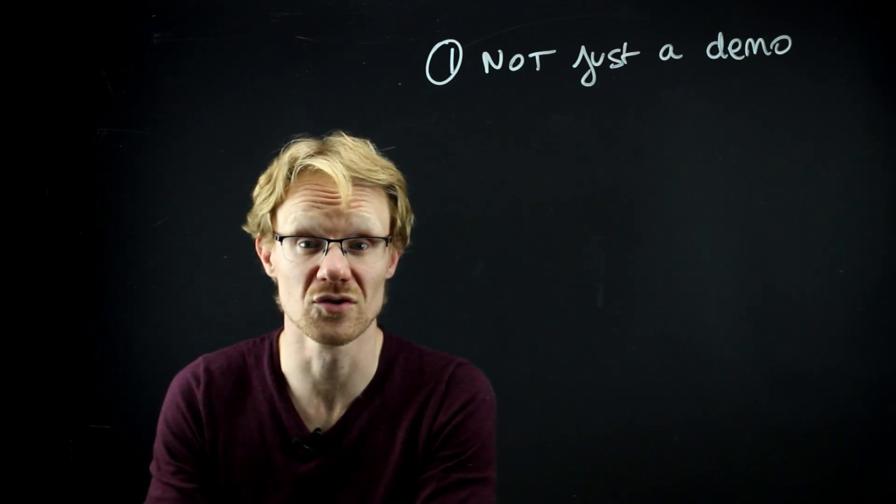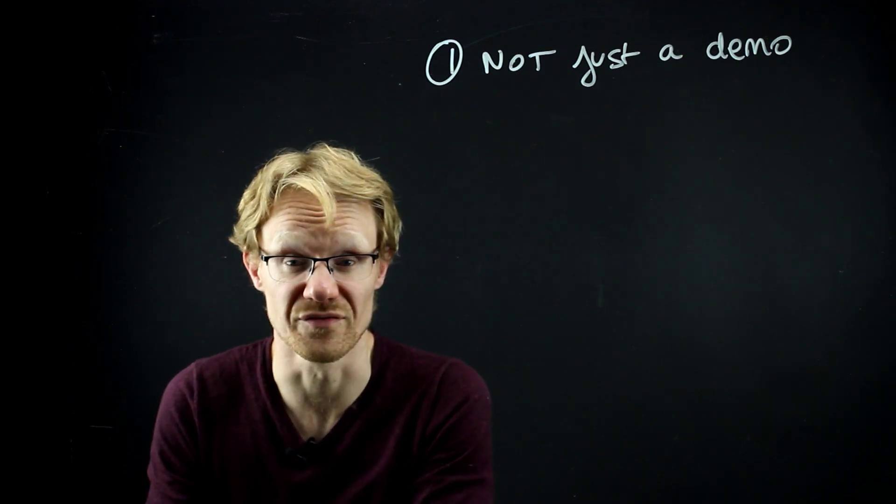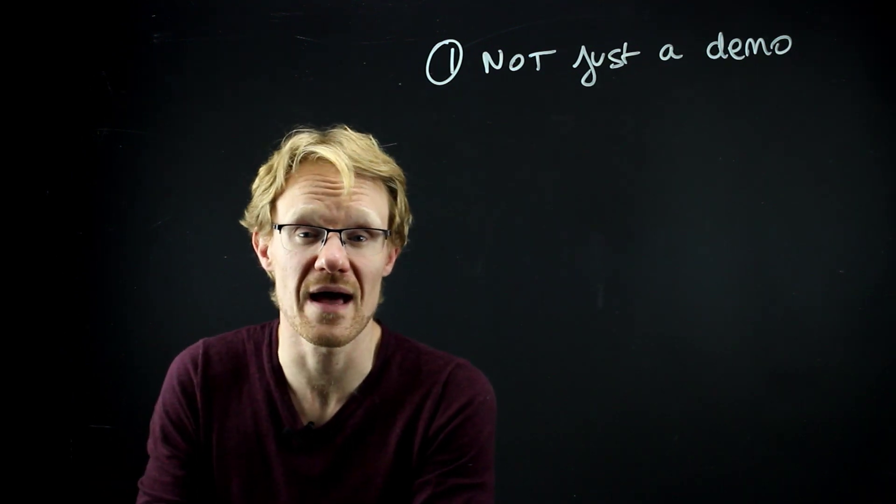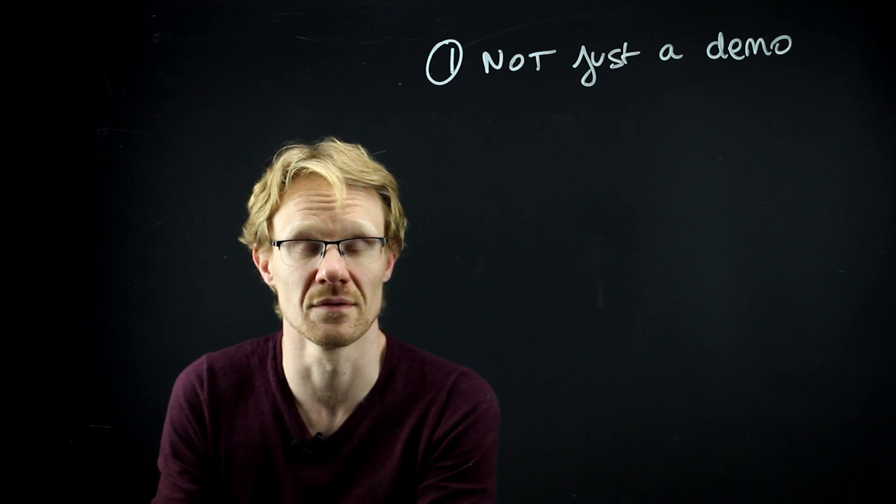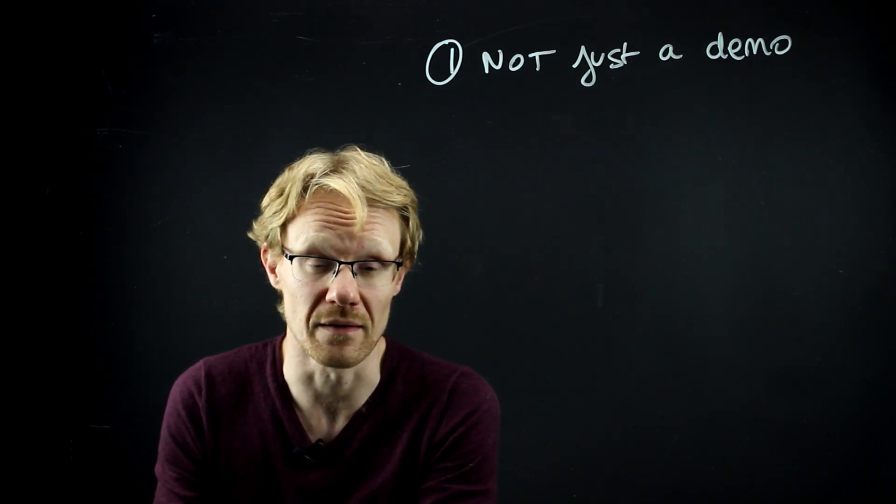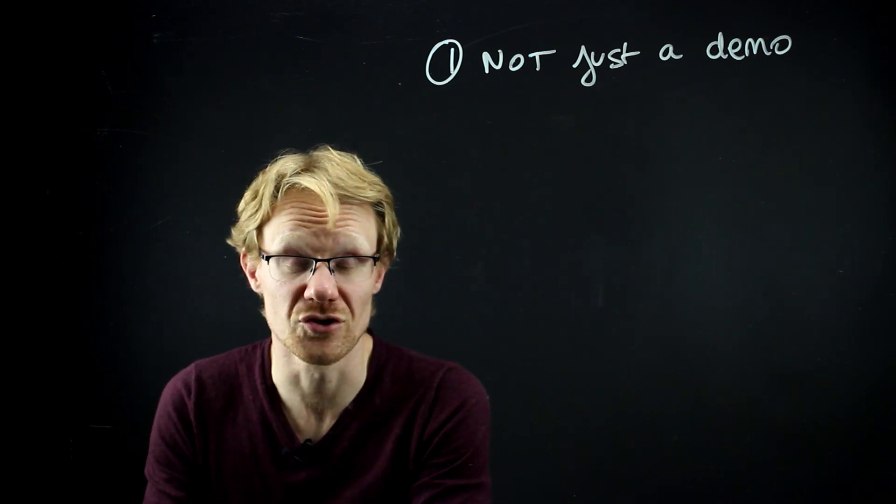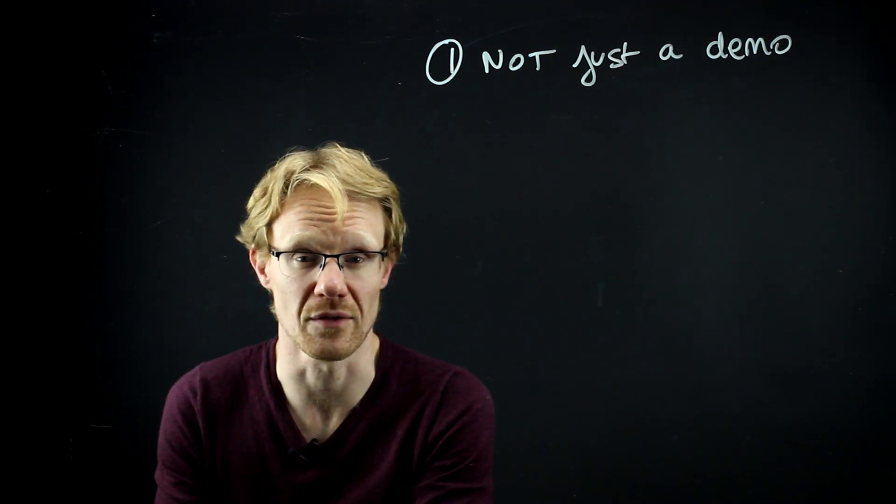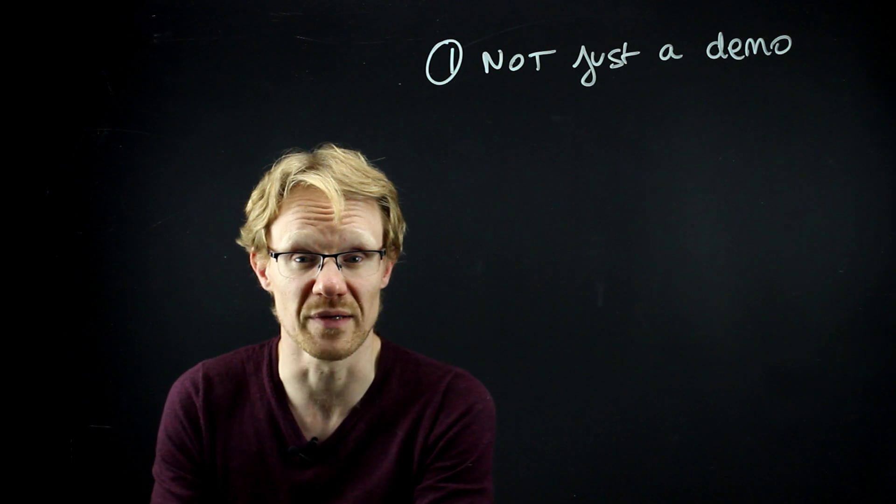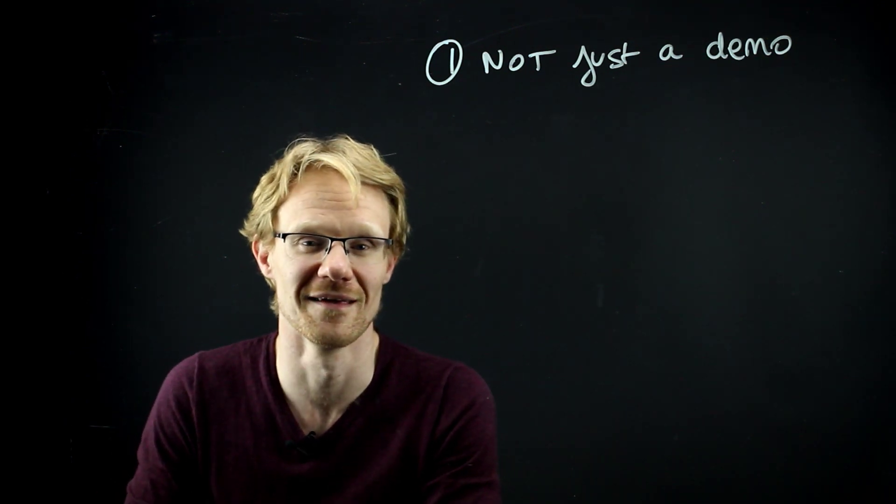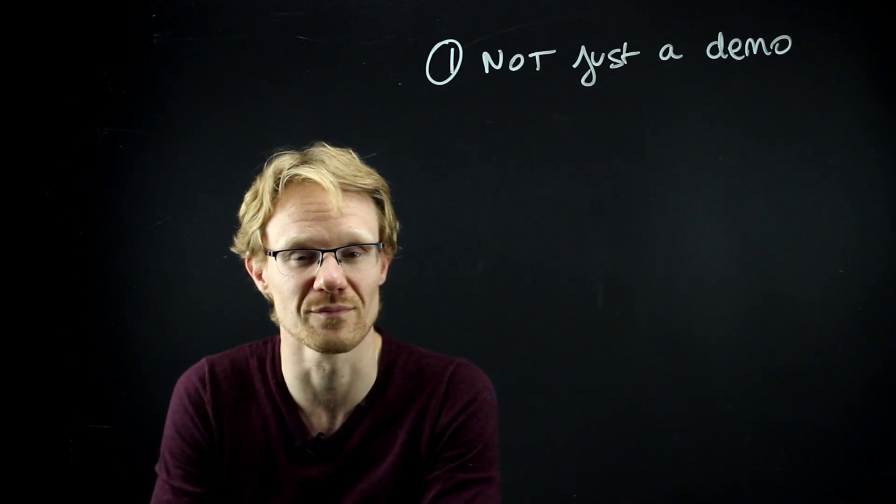It's also a decision point for the product owner, a decision about what to build next. It's the moment that you have to ask yourself the question: are we building the right thing? It's the opportunity to make course corrections. So the focus should not be on just demonstrating the work. The focus should be on getting feedback. It should be a feedback party and not just a progress report meeting.